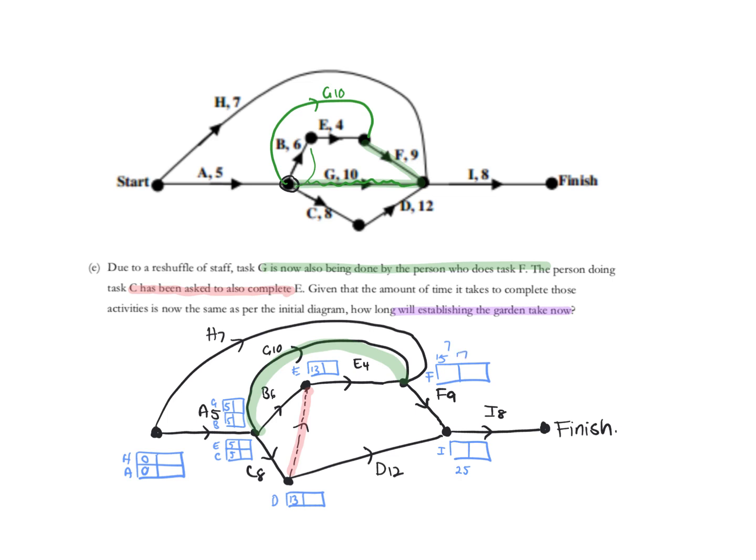So we're going to say 17 is what's going into there. And then we go down to I. 17 plus 9 is 26. So this is actually the bigger one. So I'm now going to take 26 there, and I just rub them out. And then I get to the finish, and the finish is 26 plus 8, which is 34.